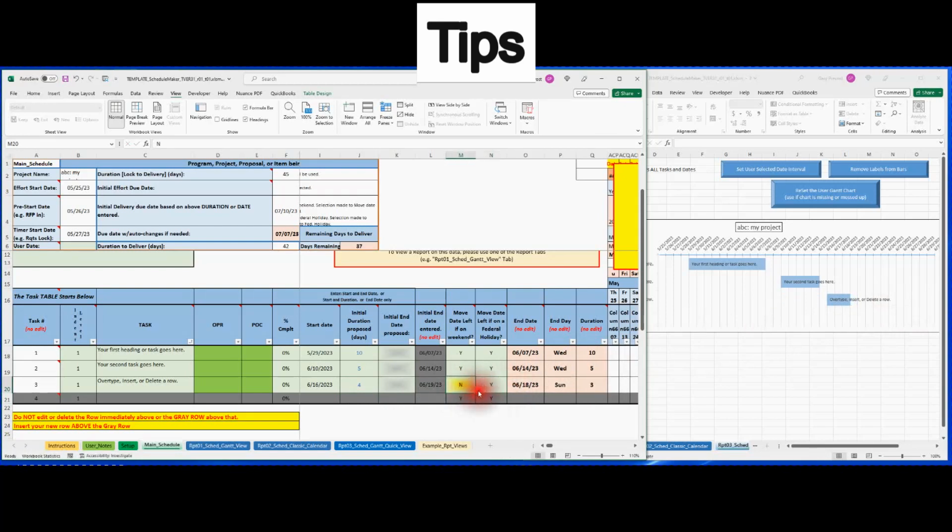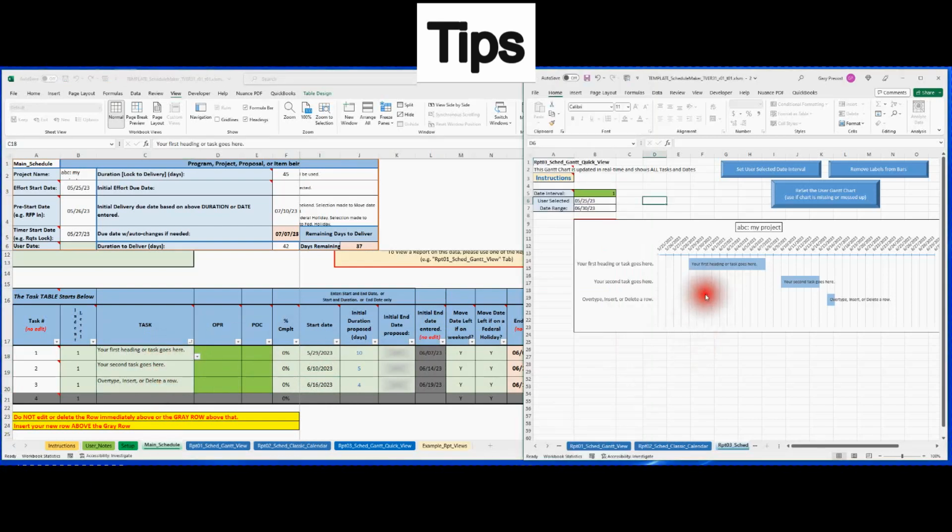So that's a quick view of how you can use the relative dates. When you make everything relative, you can have start to start relationships, including with the end, and just add your own durations as desired. And we talked about the waterfall technique, which is, if possible, enter your earliest starting dates starting at the top of the list and then work your way down. So again, as you can see on the right area here, it kind of cascades down.